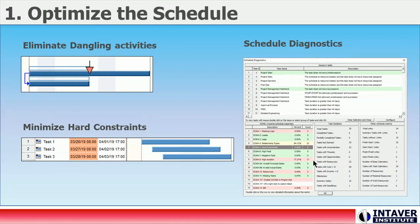The most important items are eliminating dangling activities. During a simulation, if you modify the dates or duration of activities that are missing predecessors or successors, these changes will not be reflected in the results of the simulation.